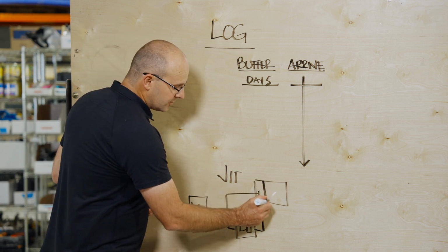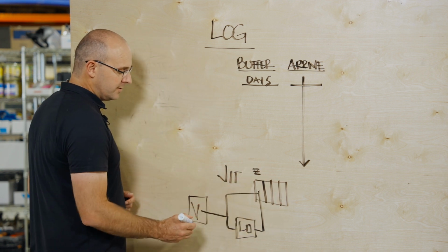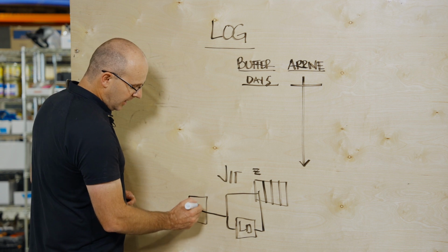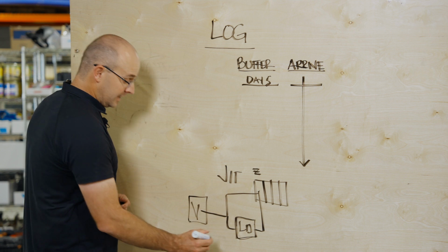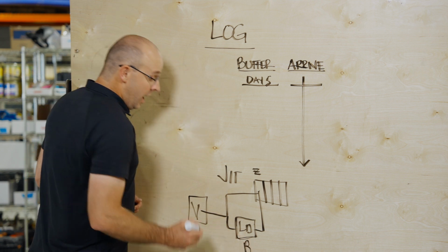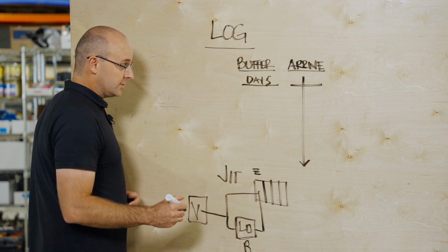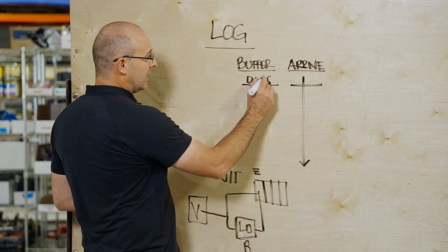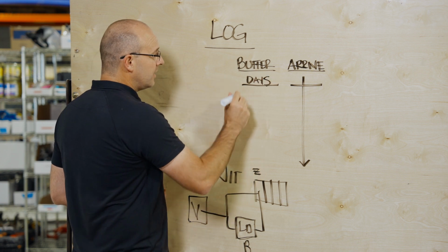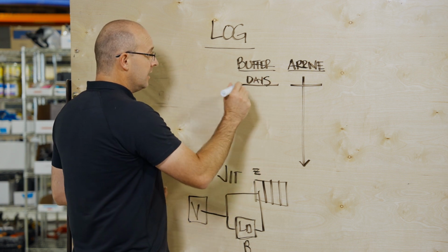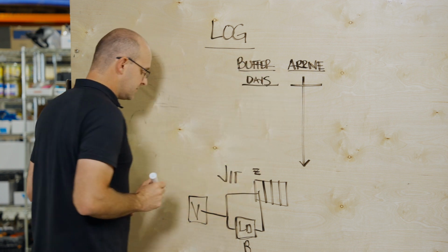And so what we'll do is we'll make sure our project is broken out by zones and that we order the material just in time, either directly from the vendor or through a laydown yard. If it's through a laydown yard, it will have a material inventory buffer amount and a duration. The duration of that goes right up here in the number of days that you want that amount of material to be there before the arrive on job site, before the needed on job site date.